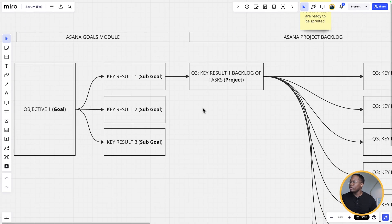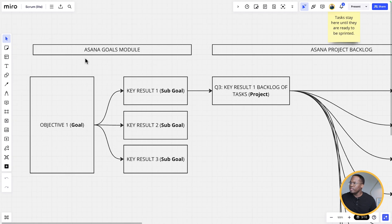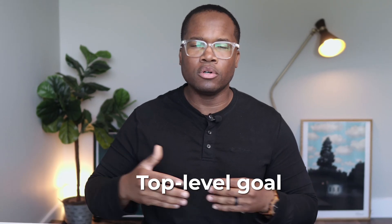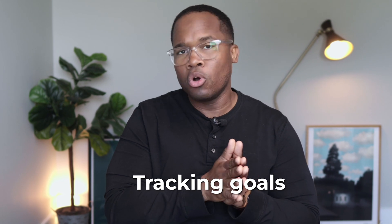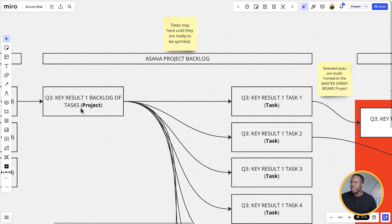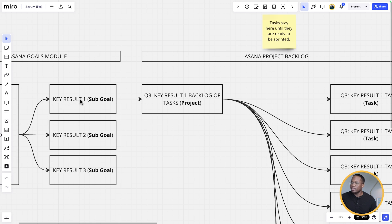First I'm going to show you around Mero to give you a high level understanding of what we're looking at today. Within the Asana goals module, we're going to have our objective — this is our top level company goal of what we want to achieve within the desired timeframe. Next we have our different sub goals, which in this case will be all of our key results. Every objective will have multiple key results, and we've used the automatic method by tracking our goal success here, tying that to a project. Each key result is tied to a project, and within that project we'll have a list of tasks — that's our key result backlog.